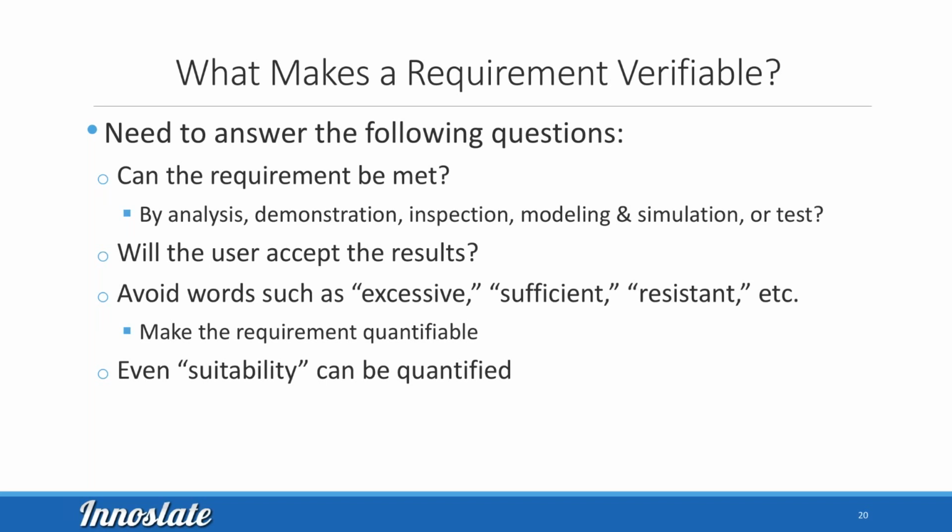So what makes a requirement verifiable? It really needs to be able to answer the following questions. Can a requirement be met? And of course, the mechanisms for that are analysis, demonstration, inspection, modeling and simulation, or testing. Those are the primary five things people usually use as the methods to verify the requirement.